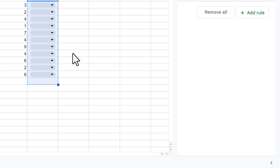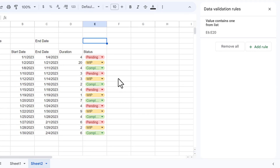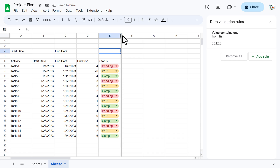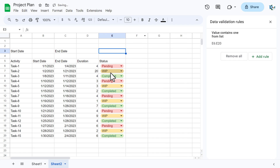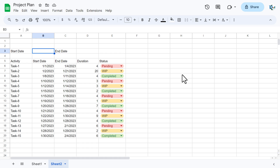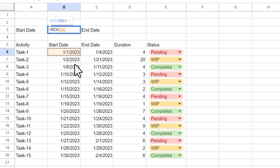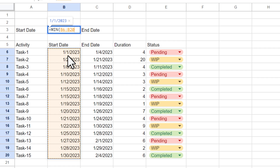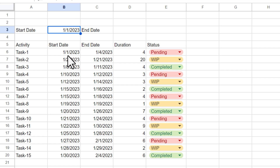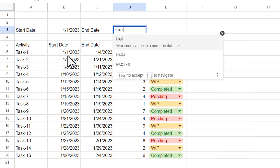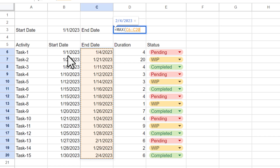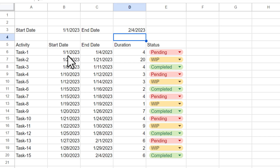Select and paste sample statuses to fill the range. Now let's resize the columns. For the project Start Date in C2, use the MIN function and select the Start Date range — this gives the minimum date. For the project End Date in C3, use the MAX function on the same range to get the maximum date.